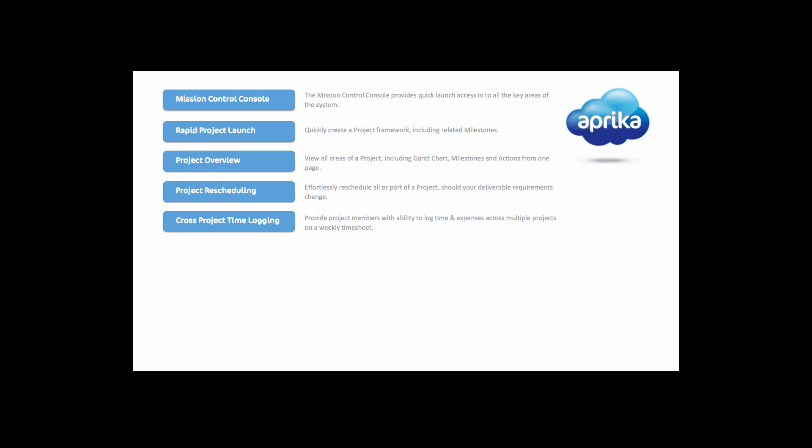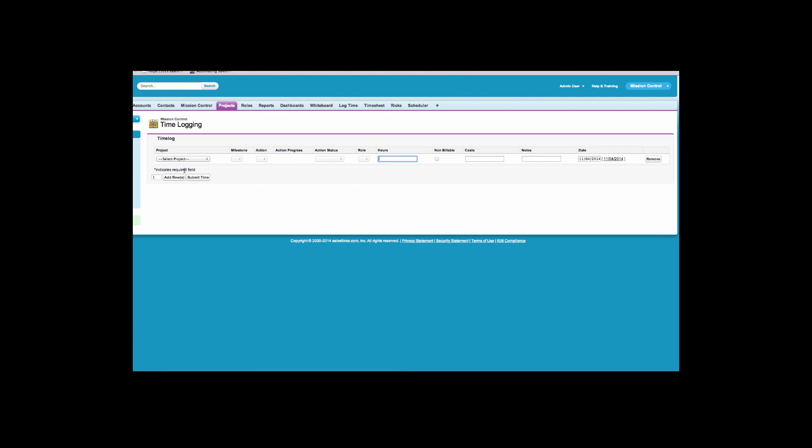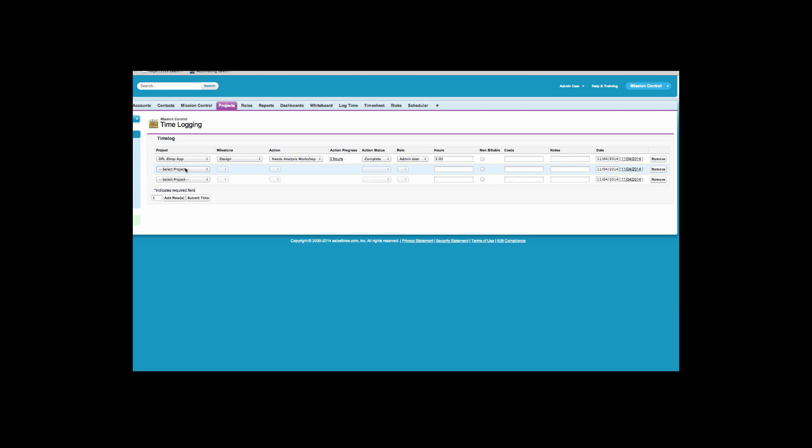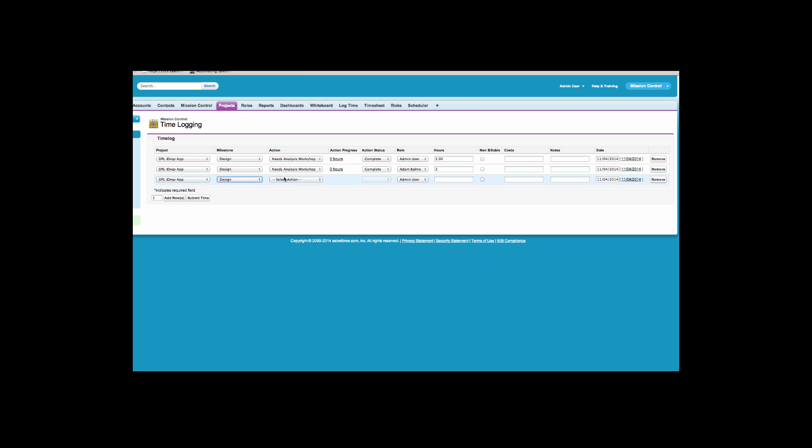With mission control it is easy for project members to log time and expenses across multiple projects. You can click the log time button from the console. Here you can log time and expenses across multiple projects, milestones and actions, and for different action owners. Simply select the project, milestone and action and complete the details. You can add and remove rows as required. Once you are done, click submit time.